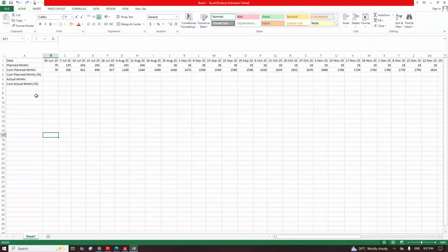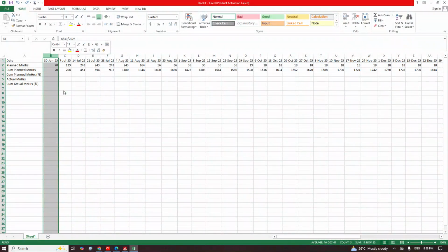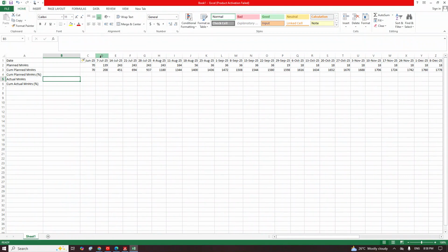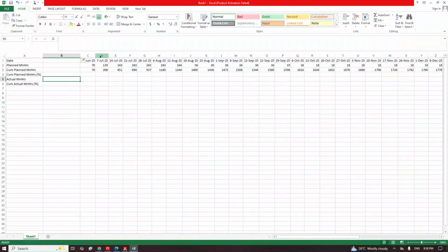Now, sorry, we are done with the first step. This is the second step. So next thing we need to do, still on the data cleaning, right? We can activate the second step. I will click here and I will insert an empty cell. So I will do 1 week backward because we always report 1 week backward. And remember, if you have been involved in graph plotting in the secondary school days or your university days, you find out that they will always tell you that every graph should have an origin 0. So because of that, we do 1 week backwards and we give our graph a 0 origin. Because we want our curve to start from 0.